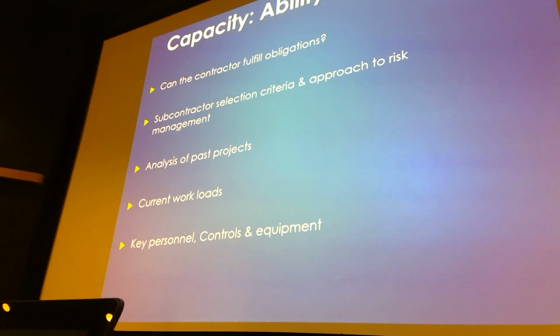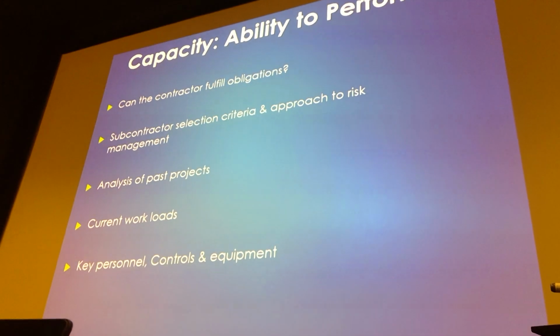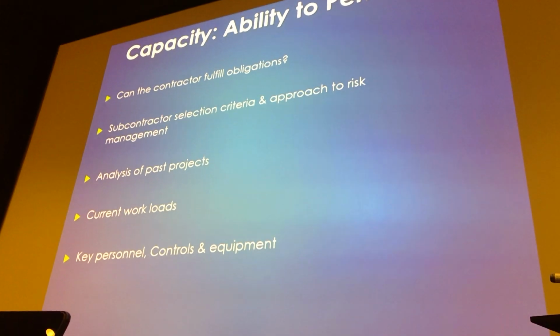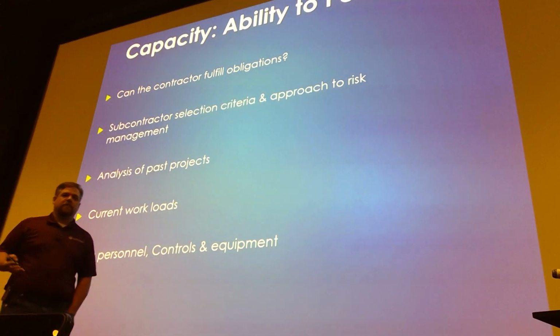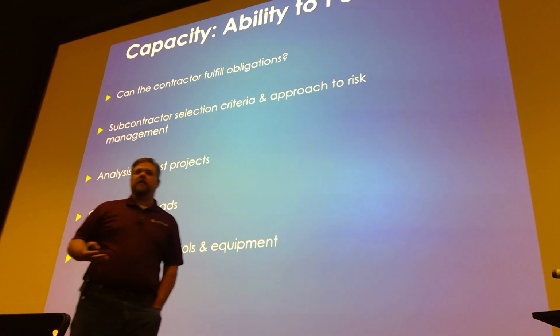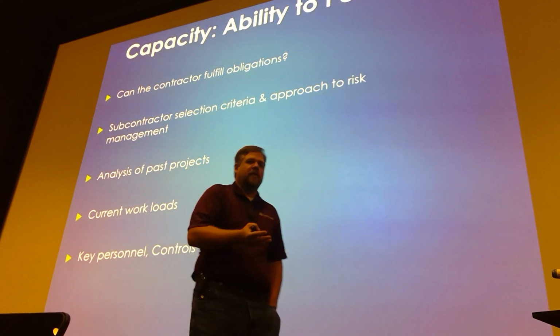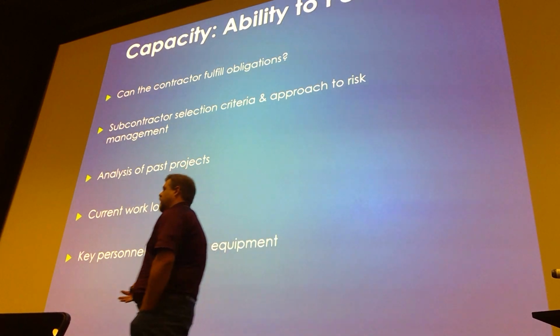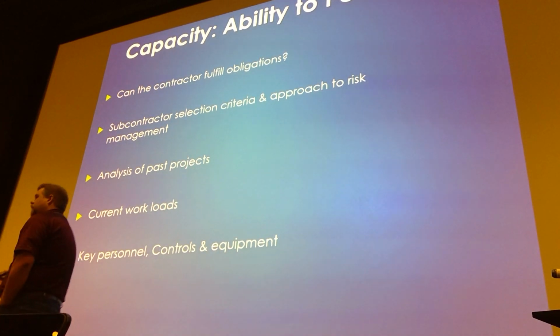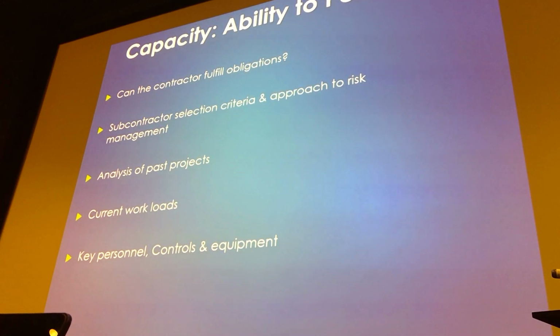All right, capacity, some of the things we talked about, capacity. Do you have the labor to deal with it? Do you have the management personnel to deal with it? You may be the greatest builder of HEBs in the world, but if you've already got your entire staff out there managing HEBs, well, then you may not be able to handle one more HEB. So there's a capacity that every company has.